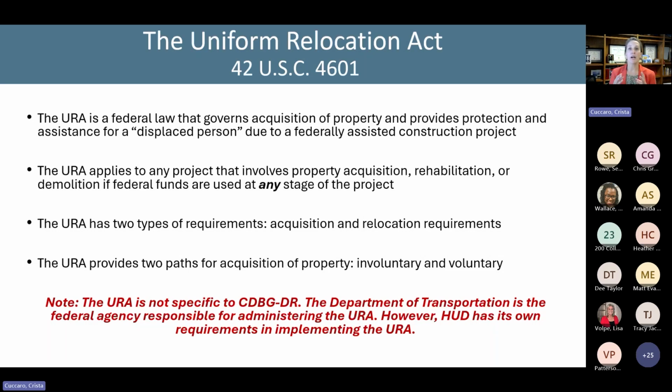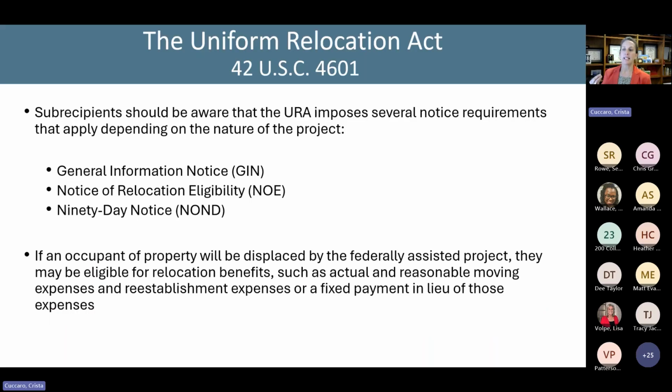So if the URA applies, one of the big things that you need to know, besides planning your process, is that there are notice requirements. I've got them listed here, and I'll talk about them in a little bit more detail. But these notices are really critical under the URA, right? Because they're giving notice to a property owner that their property may be acquired, or a tenant that they may be displaced due to this project. And then if one of those things actually does happen, there are additional notices that need to be given.